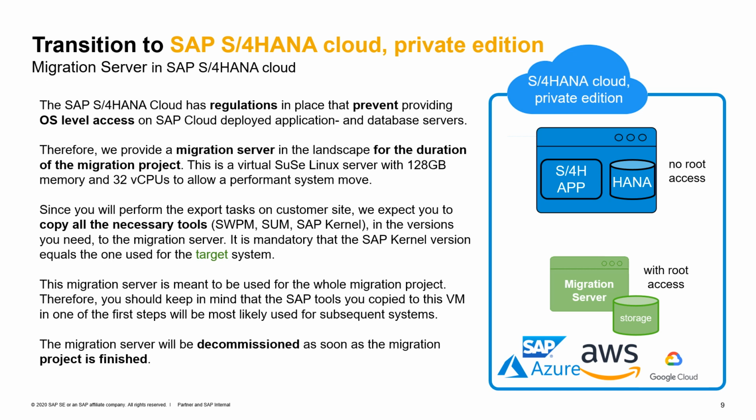The migration server is there to be used during the overall project and to manage the conversion or migration into the different environments you have in the target, including development, quality, and production. You will also need to clean up the migration server between the different executions so that the system is ready to run the next iteration in your conversion or migration project.